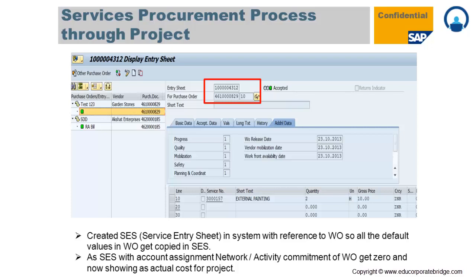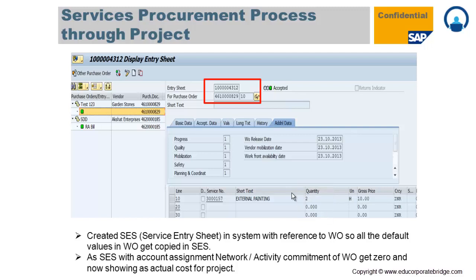After a work order, just as there is a GRN for material, for services there is a service acceptance called a Service Entry Sheet (SES), created using transaction code ML81N. You need to provide the appropriate work order number, and your service entry will be created against the work order. You provide the accepted quantity — for example, if ten units were ordered you can accept fewer — allowing partial SES creation against each work order.